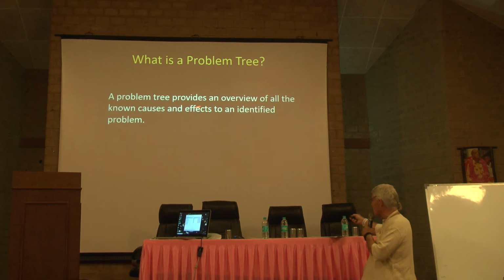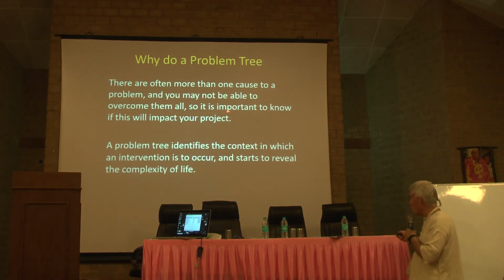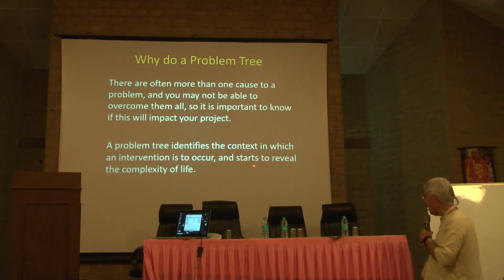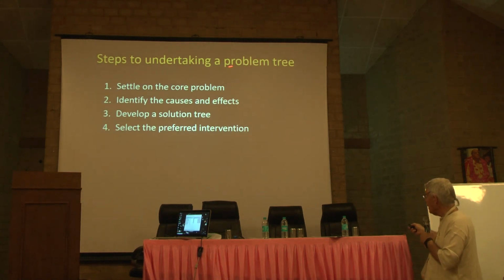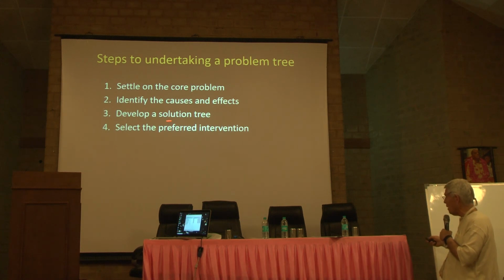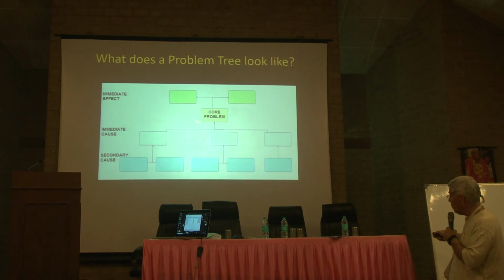The known causes and effects to an identified problem. More often there's more than one cause. So this, where the interventions are to occur: settle on the core problem, identify the causes and effects, develop a solution tree, and select the preferred intervention.